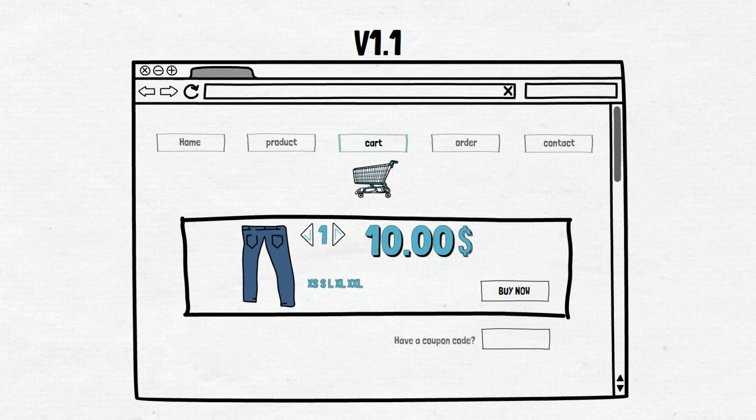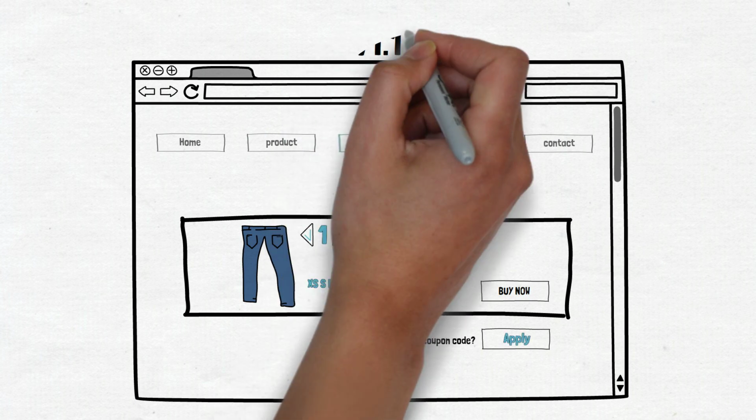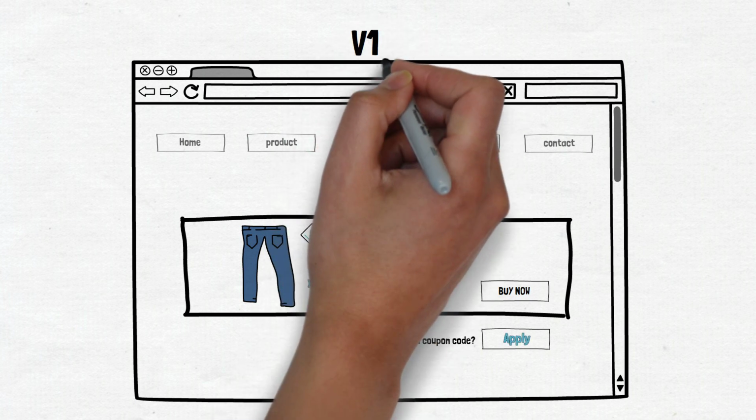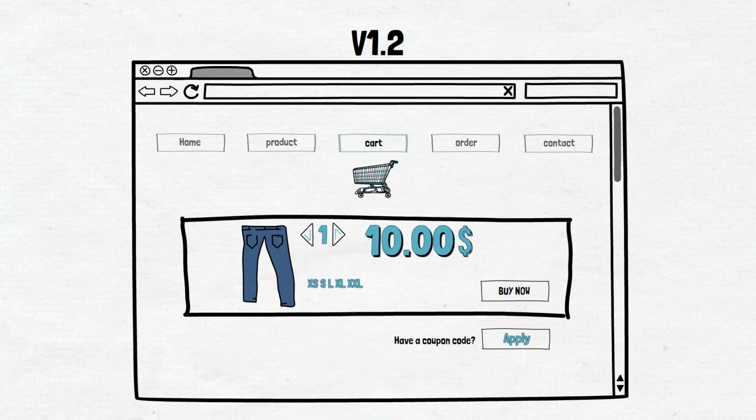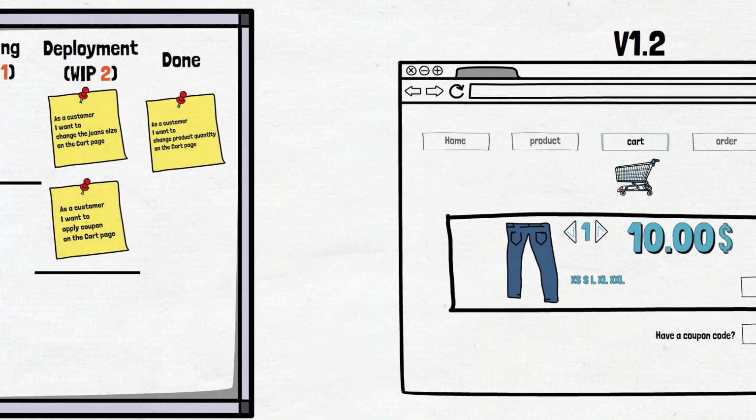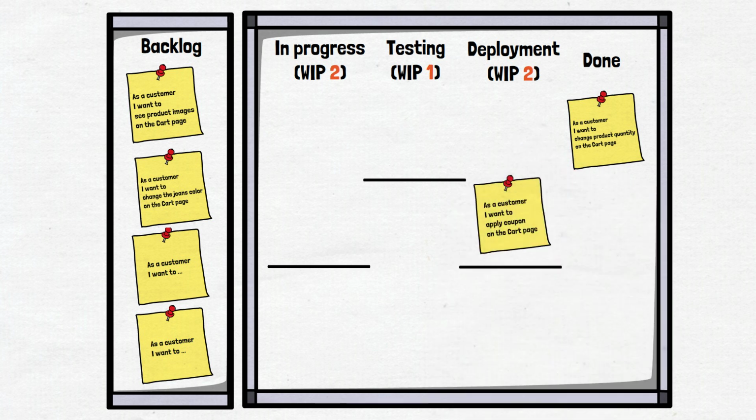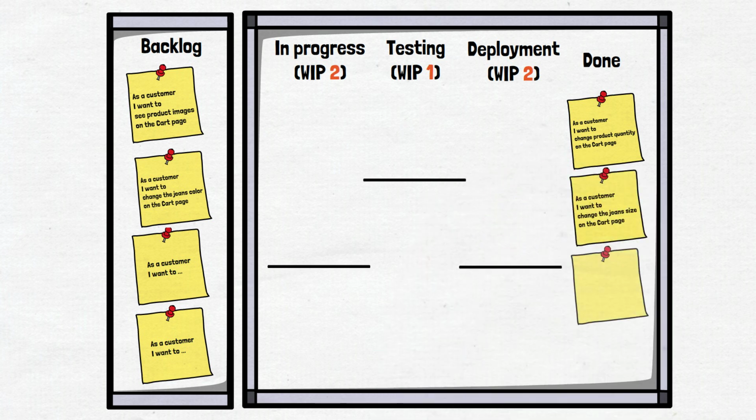Work flows continuously through the system instead of being organized into distinct time boxes. Scrum sprints have start and stop dates, whereas Kanban is an ongoing process. Kanban boards are more flexible with regard to tasks and timing. Tasks can be reprioritized, reassigned, and updated as needed.